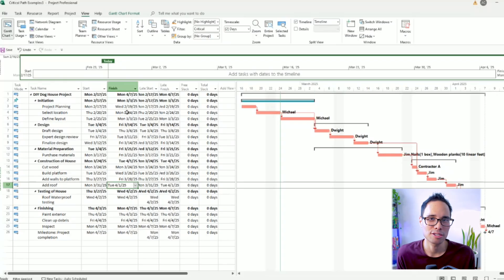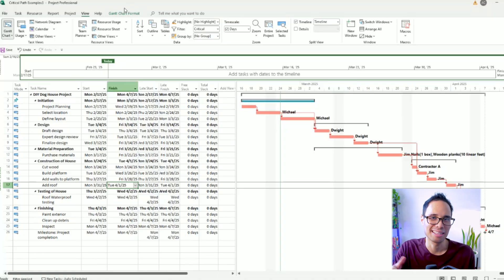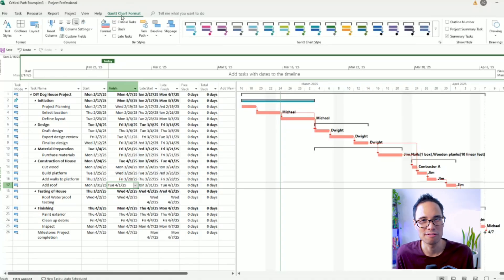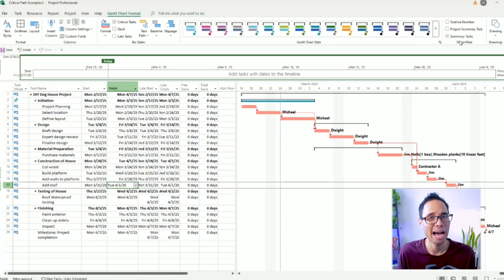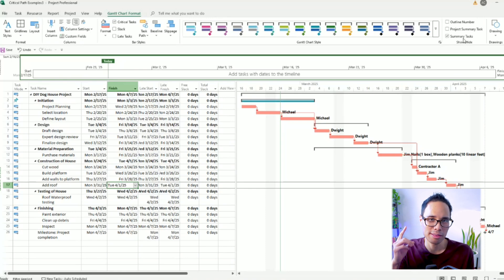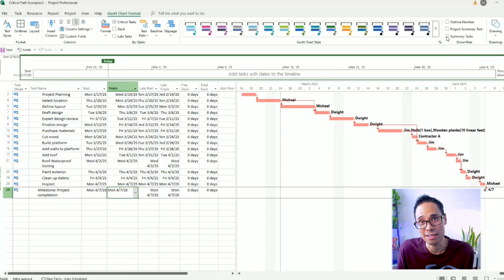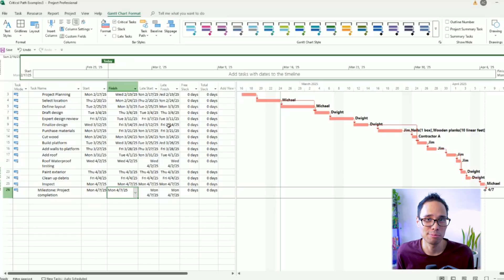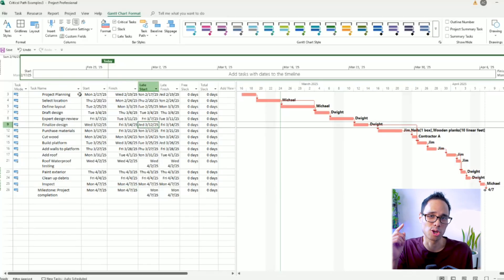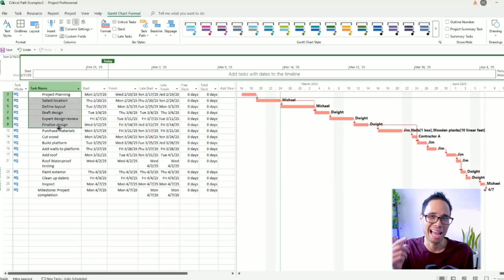Now let's say that you don't want to see any of these summary level category tasks. You only want to see the tasks themselves. Here's how to do that. Move your mouse to the top ribbon panel and select the tab for Gantt chart format. In the panel for Show Hide, check mark the box for summary tasks so that it's unchecked. And voila, now our table only shows the critical path at the task level. Pretty impressive, right? Aren't you glad you're watching this video so you can learn these shortcuts faster?